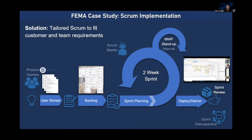Thinking back to all of the terminology Rob spoke through with Agile and project management, and taking some of the best practices from each, we projected them onto emergency management GIS support. User stories essentially represent all of the features, products, or tasks — the broad goals the team needs to support. Those get broken down into discrete tasks, discrete cards or sticky notes — think back to the Kanban board — and put into a backlog.